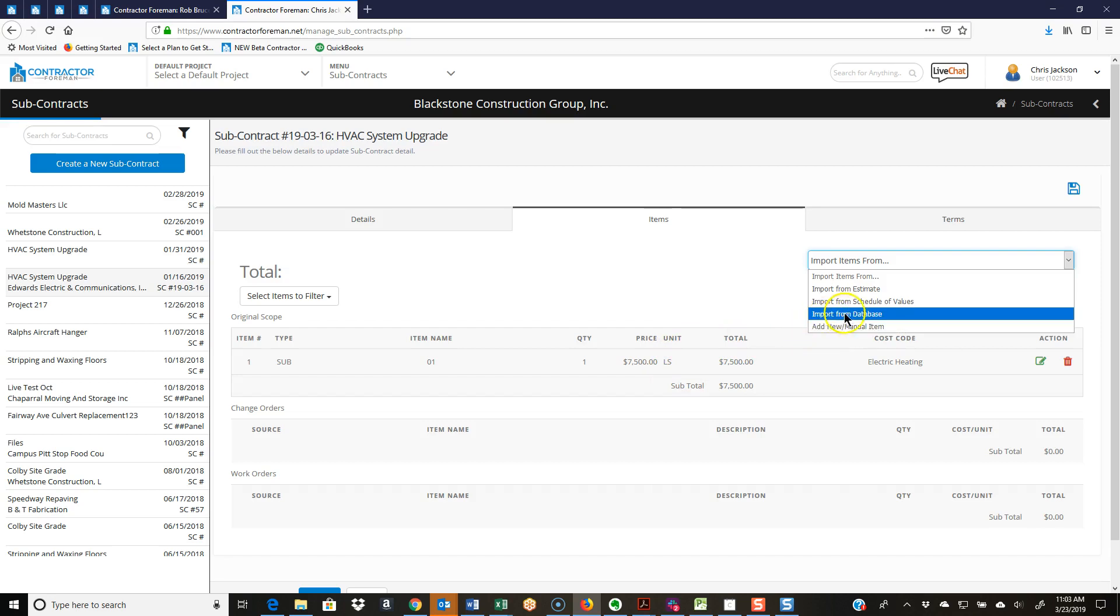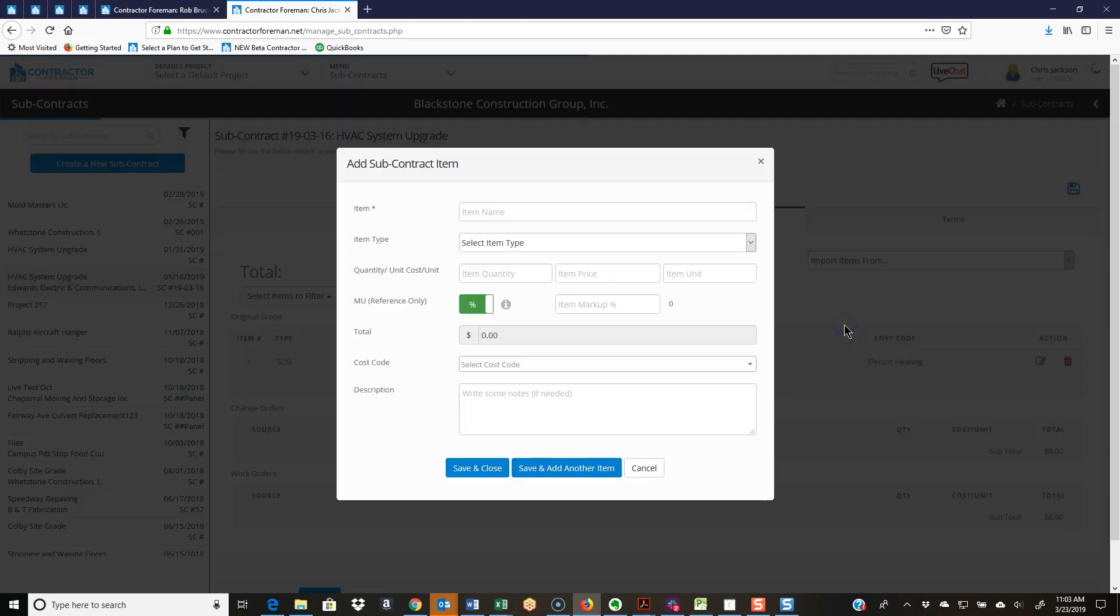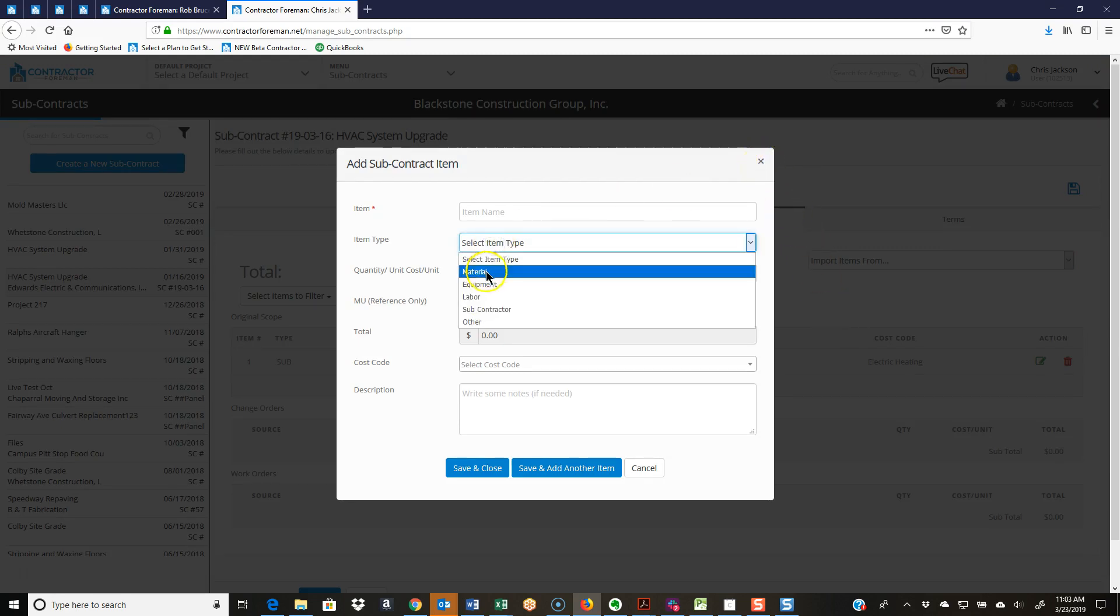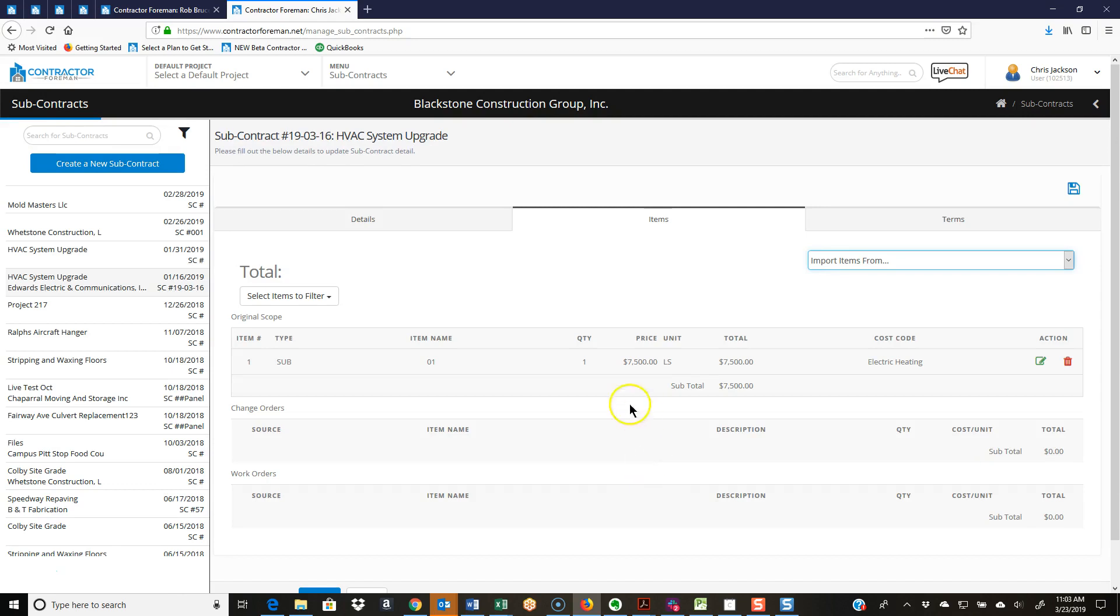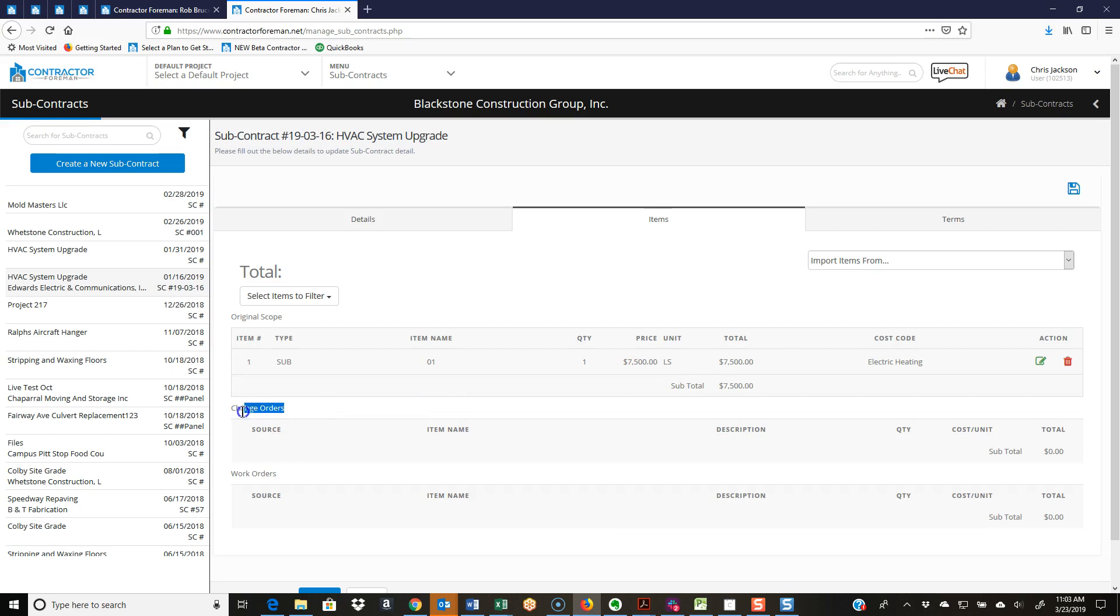You can import from a database or add new manual item. Adding the new manual item brings us up that form to fill out. Now remember to do your item type and your job cost coding - very important. Typically a subcontract is a lot of time just a single line item because it's just a scope of work for a set price, as we can see here. We have quantity one, seventy-five hundred dollar lump sum.